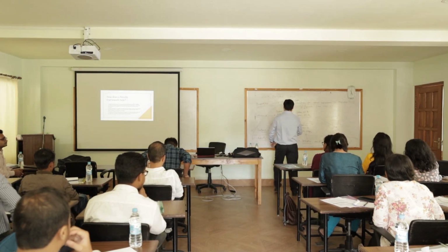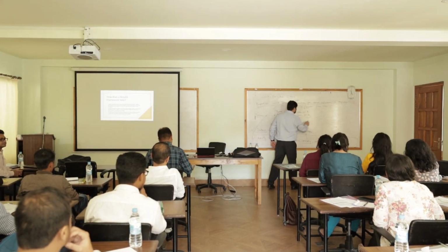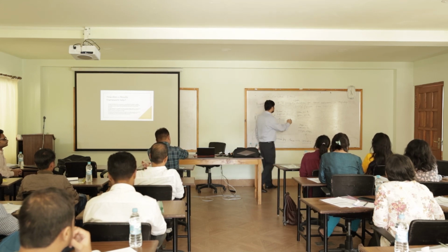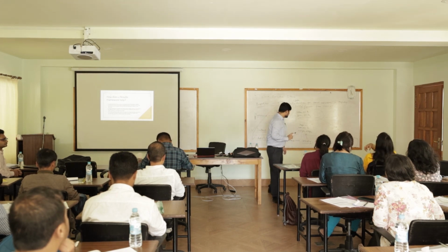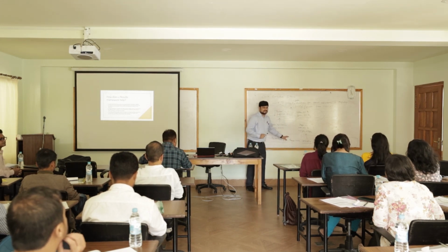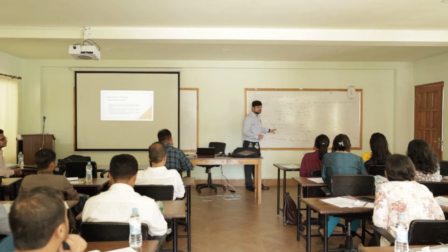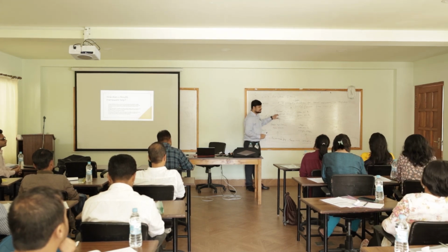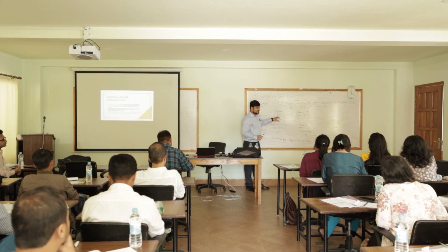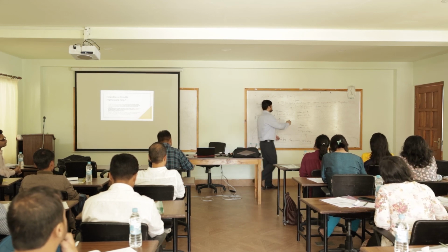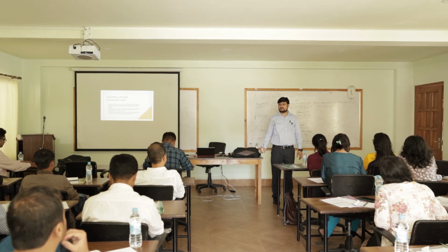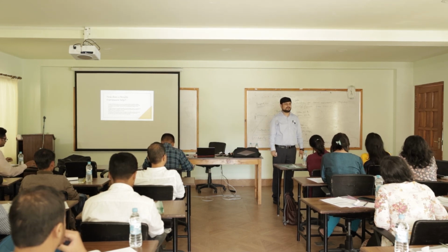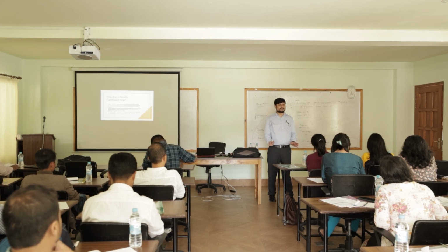Yeah. And what we are saying is that there'll be 2 to 3 more outcomes that would have come up, and finally they are translating into this. This is the hypothesis that if I conduct these many activities, this will translate into these many outputs. These many outputs will translate into these many outcomes, and these many outcomes will finally address my target, which is my impact level indicator. Simple. This is very simple, right?